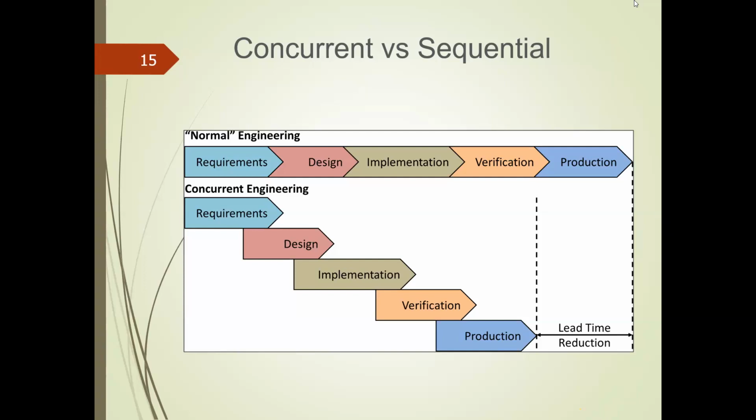the project team now hands over the deliverables to the parties. In the case of a production unit, the project team delivers to the production department, so the production head takes care and takes control over the production unit. In the case of a warehousing unit, the project team hands over the warehousing activities and everything to the warehousing team.